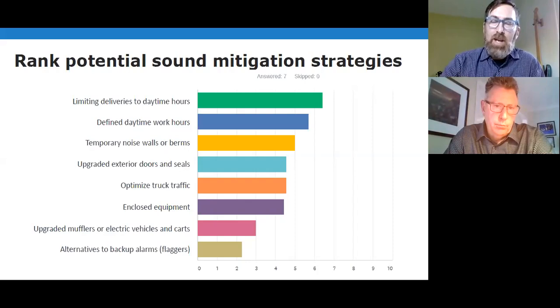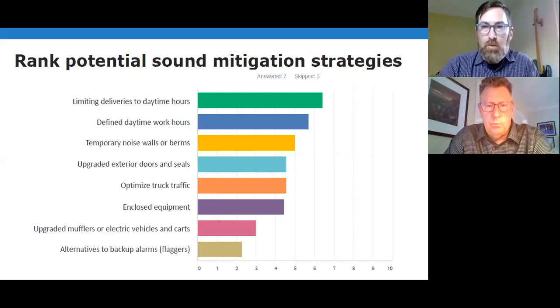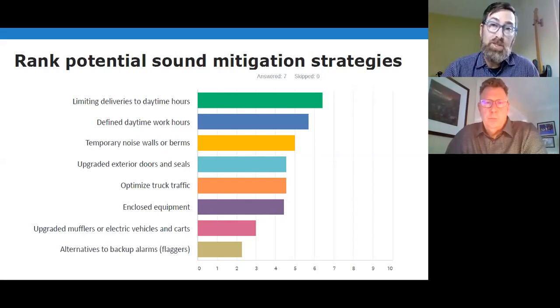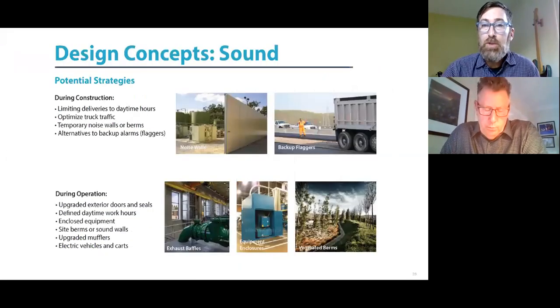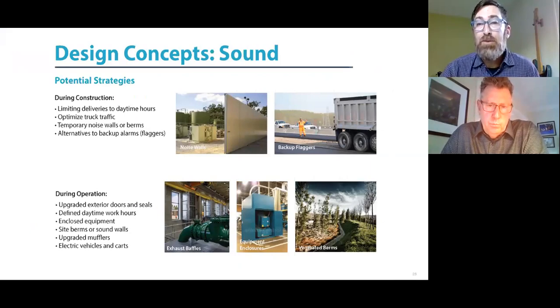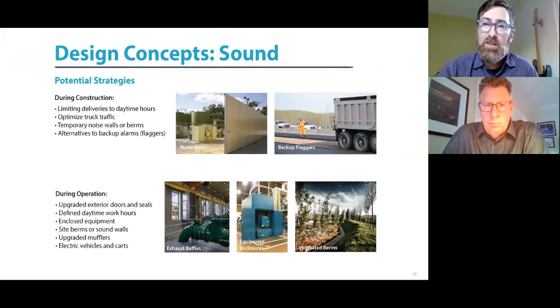Yes, that is a strategy where additional personnel would be hired and be on site. Instead of having backup alarms, which are there to notify someone on the ground that the truck is backing up, you would have dedicated personnel flagging, clearing the zone for the truck to back up into. There are also alternative mechanical devices that don't emit such a high frequency alarm that are now on the market,